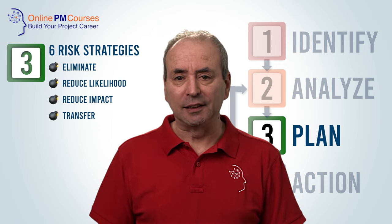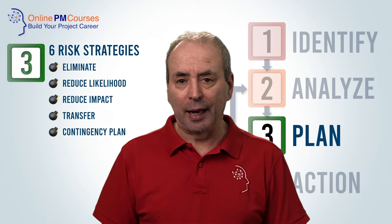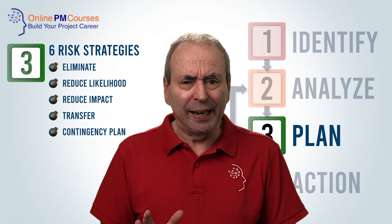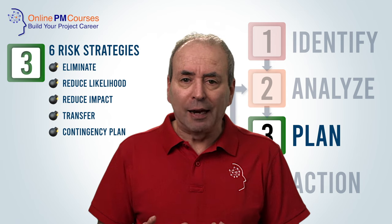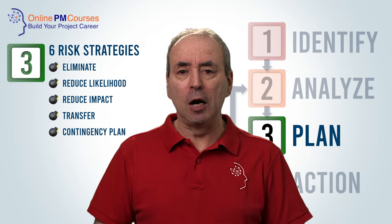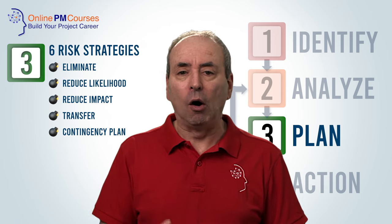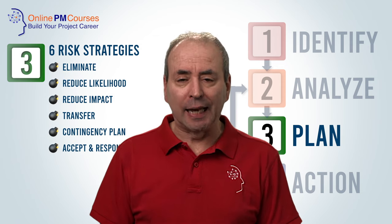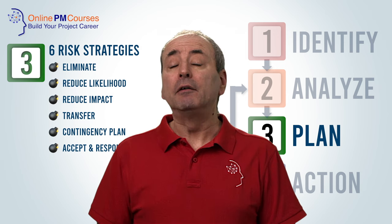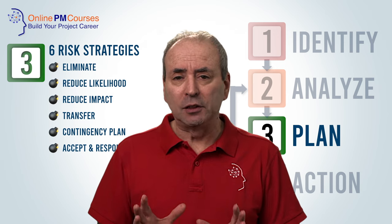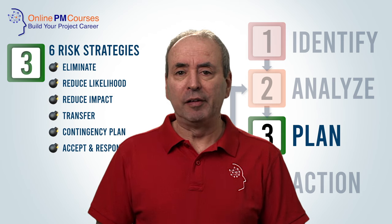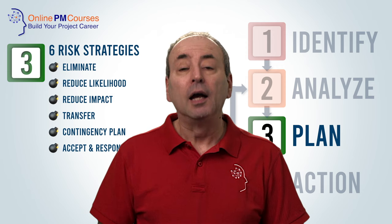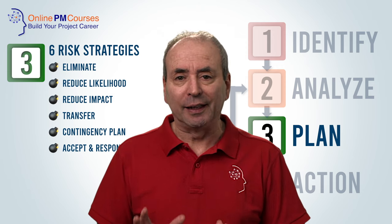The next strategy is to put in place a contingency plan. This won't make the risk any less likely to happen and it won't make it any less bad if it does, but you will have a plan for how to manage it in the moment so that you can reduce the ongoing impact. The sixth strategy is to accept the risk. If the risk is not very large, not very serious, not very likely, then none of the other strategies may be cost-effective.